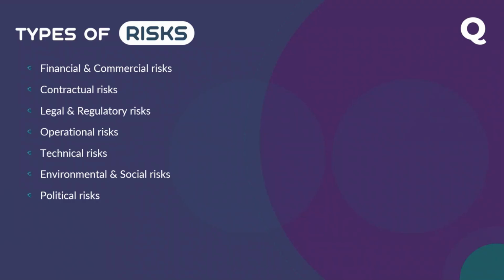And if there's a nomination, the client is asking you to appoint a contractor under your paper, at that point, how his contract or his act will indemnify you. That means save you from his mistakes. That also you have to check. So ambiguity, discrepancy, and third party are things hidden somewhere, actually, guys. So the hidden points you should pull out and resolve before you enter into the contract, so that there will not be any dispute.